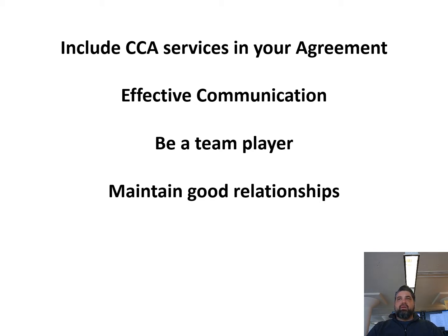The design, bid, build, contract structure is inherently adversarial, right? Because there's no contract between the owner and the architect and the contractor, and so both are independently contracted with the owner.